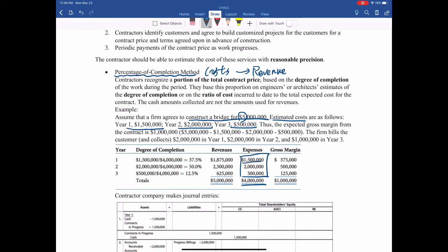Each year's expense divided by the total expense of $4 million gives us the degree of completion. In the first year, the project will be 37.5% complete. In the second year, another 50% complete. In the third year, the remaining 12.5% complete. We use the degree of completion multiplied by the $5 million to get the revenue. The difference between the revenue and expense is the gross margin. The total of the three years equals the total contract price subtract the estimated cost, which is $1 million.